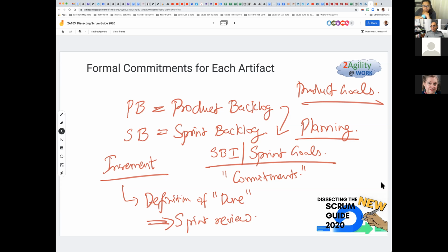That's your product goal. But that's the larger overarching goal, that you want to get this product out to the market. But then you're not going to build all of the product all at the same time. So then you go into planning. In the context, you're aware of the overall goal: yes, we have to ship this new product with these new features by this date. You then go into sprint planning, where you say, what can I do in the next 3 or 4 weeks that I can now commit to do?